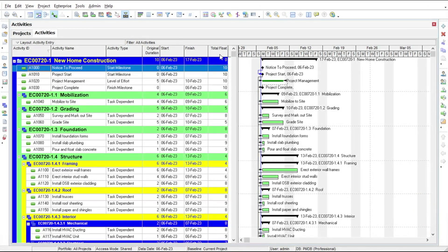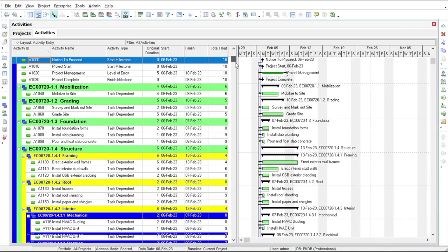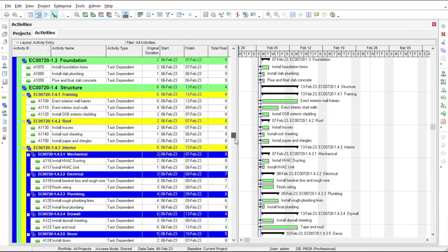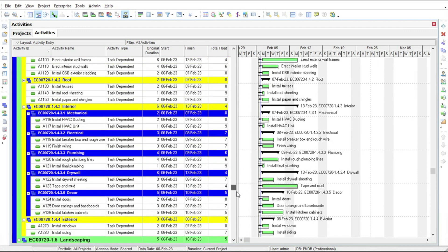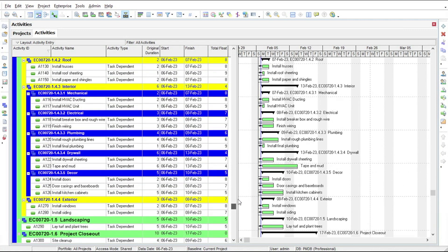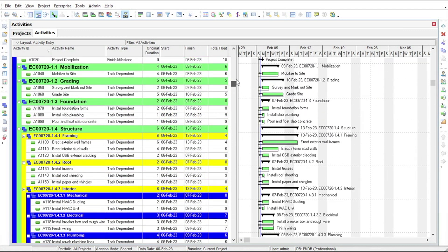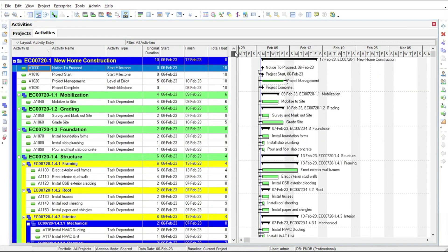Having entered all the relationships for our new home construction project, we are ready to perform a critical path analysis on our schedule. We need to do this in order to calculate the planned finish date for the project.